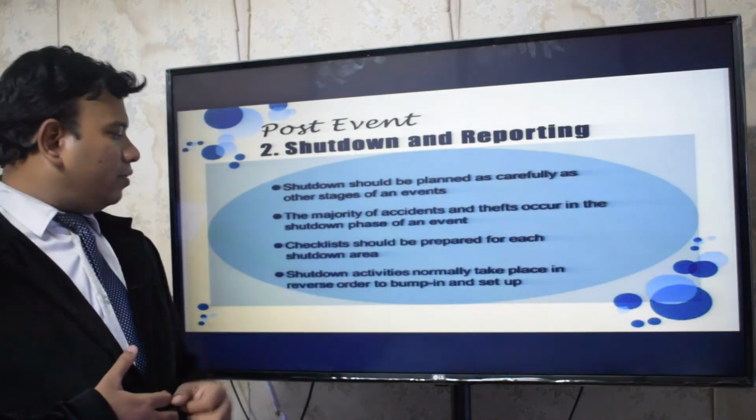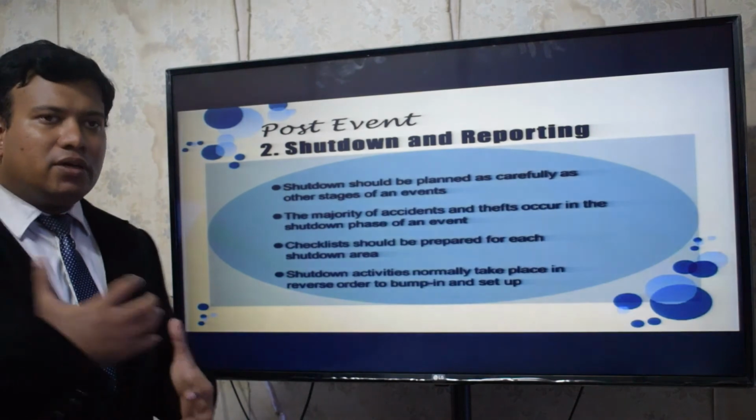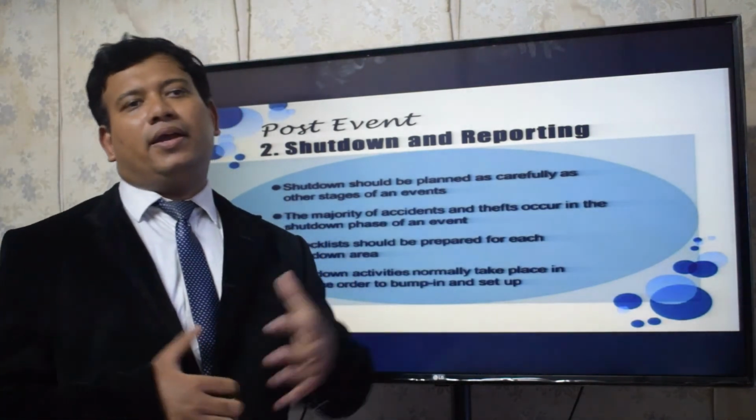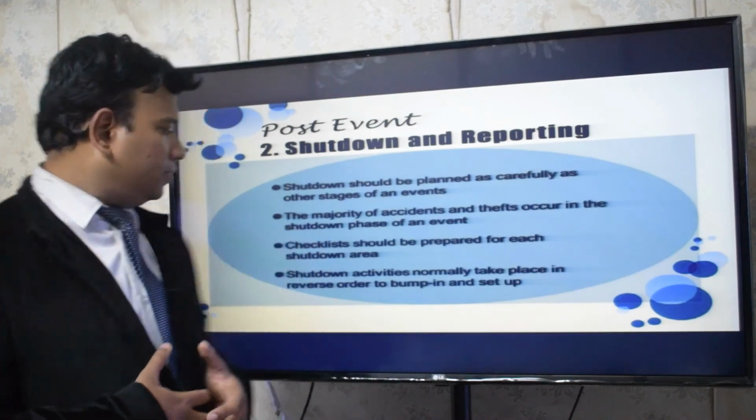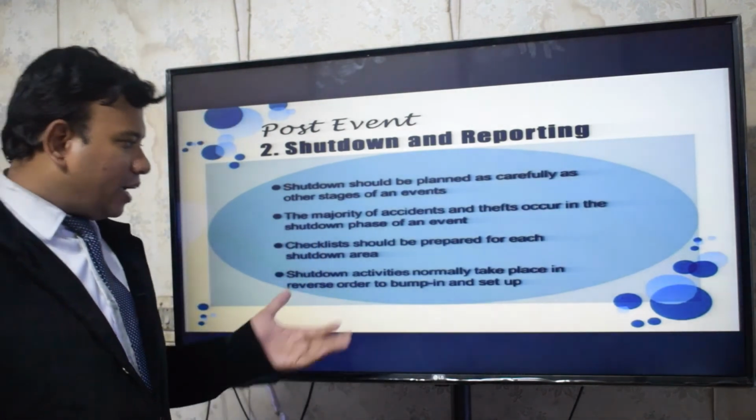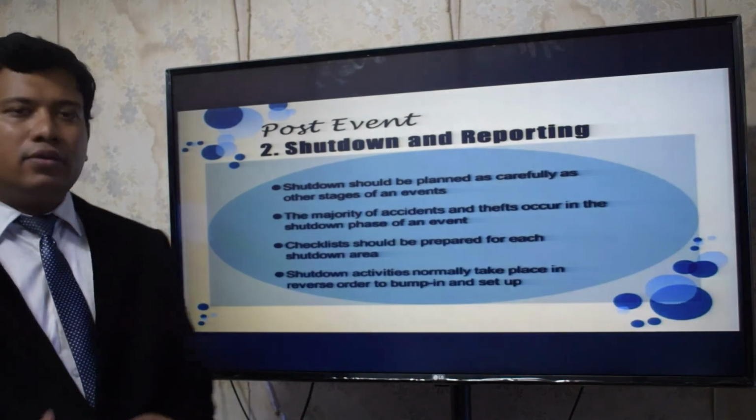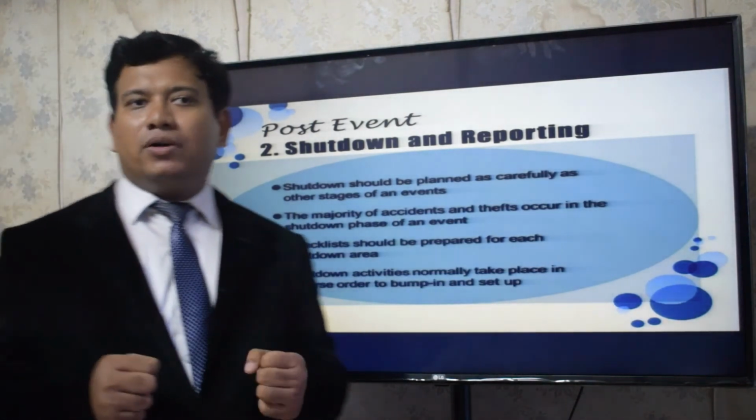A checklist should be prepared for each shutdown area. After the area is cleared, we have to make a checklist so nothing is left over. And shutdown activities normally take place in reverse order so that we have a clear setup.